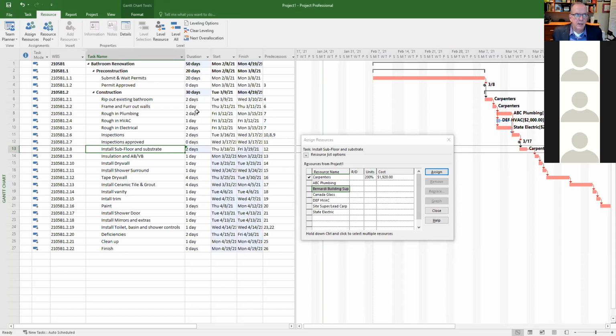It's kind of like if I had a long ditch to be dug and I said, I'm going to hire Nick to dig this ditch. All right. And it's going to take Nick 2 weeks to dig it. And so then I changed my mind and I say, you know what? I'm going to get Nick and Kevin to dig it. Well, logically, then it shouldn't still take 2 weeks. It should take 1 week.